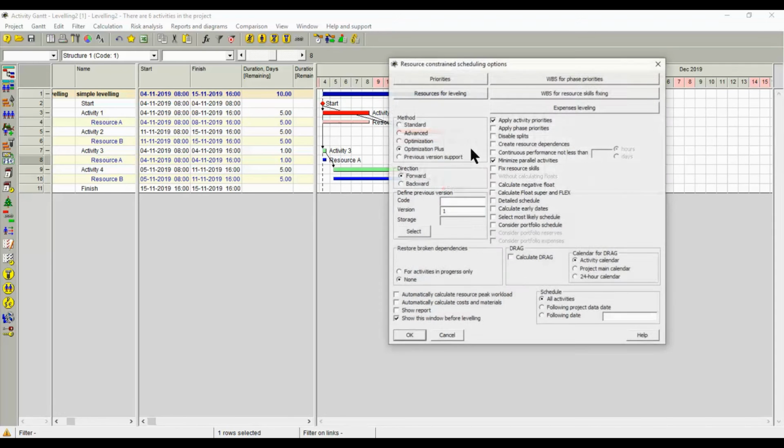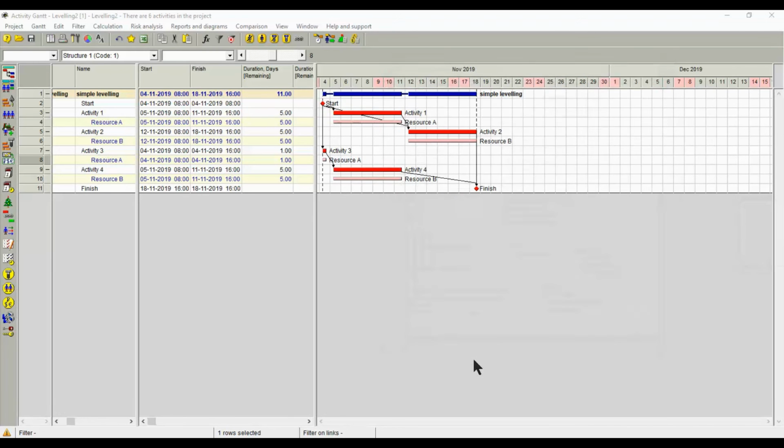If we use resource leveling, however, you can see that it produced a human-like result, which is 10 days instead of 15 days in Primavera and Microsoft Project. So you can see that on such a simple project schedule, it is possible to see the differences between resource leveling algorithms of different tools, and Spider here comes the best.